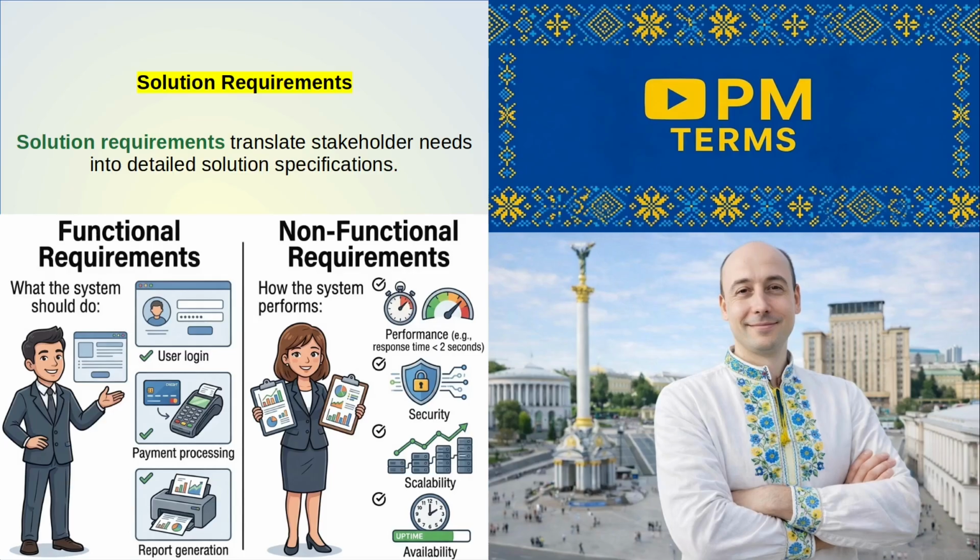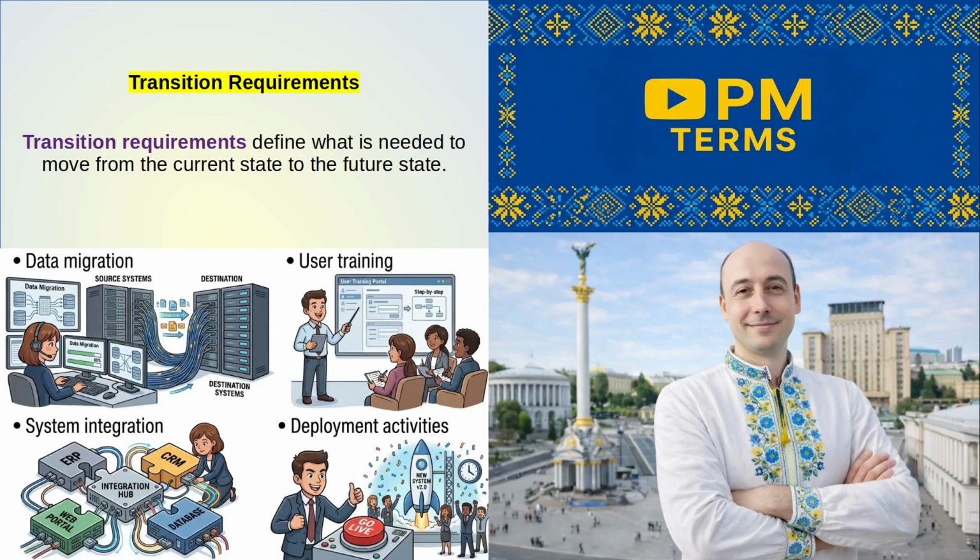Non-functional requirements describe how the system performs. For instance, performance, security, scalability, availability. If solution requirements are unclear, developers build their own thing. Testers validate their own criteria. Stakeholders reject the outcome.